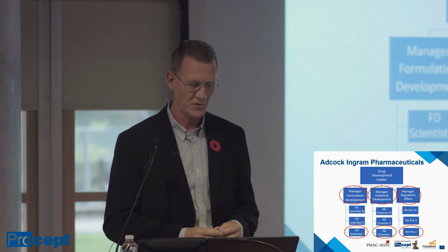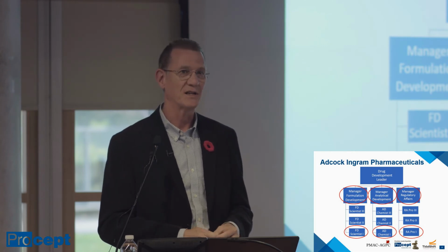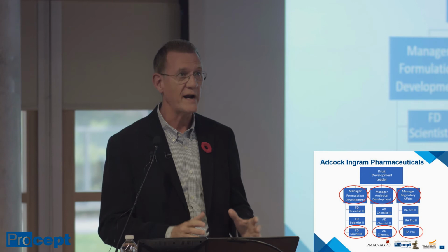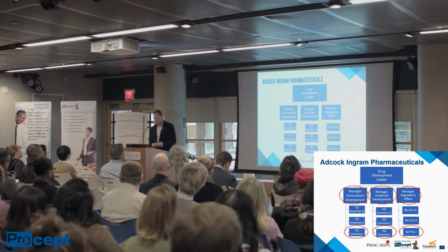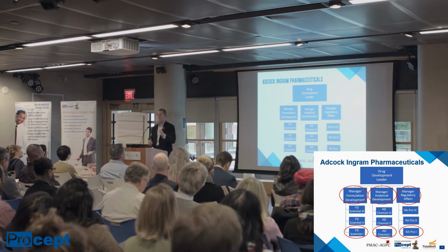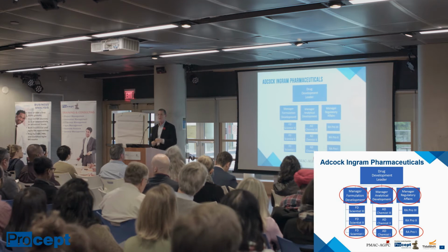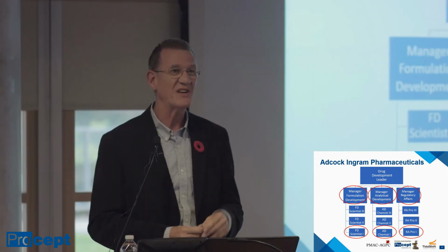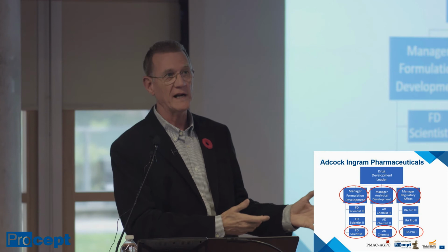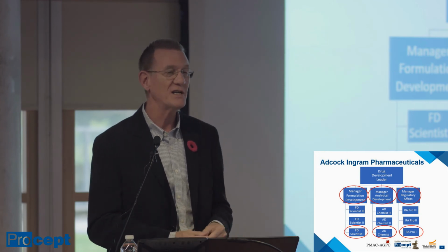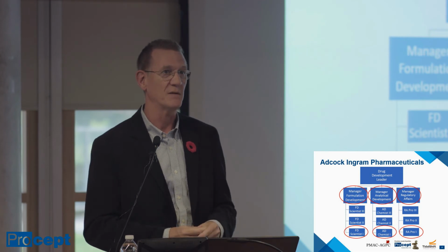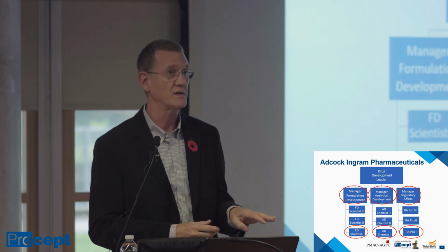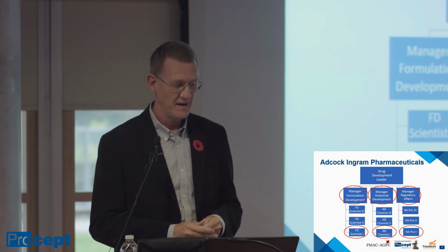Yes, they looked at me kind of strangely initially, because they'd never heard of this before. It was a brand new concept. So how we did this was we said, all right, let's say the manager of the formulation development area is really good at formulation development, right? So he doesn't need a really strong formulator person on his team. So let's choose the weakest formulation person and put that person on his team, because each team has to be represented by all the functions, right? That's what a matrix is. And so that's what we did.